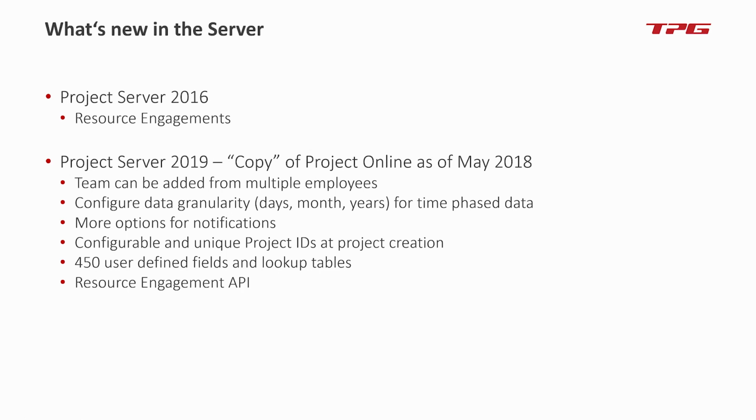The resource engagements, as I pointed out, have their own API, so you can read and write the data into it. And why is this specifically interesting? Because it offers me a possibility for top-down portfolio level planning and demand of resources. Yeah, it's really more capacity planning at a very high level. I'll show it to you briefly in a minute or so. And the data for this can come from different sources. That's the reason we pointed it out here.